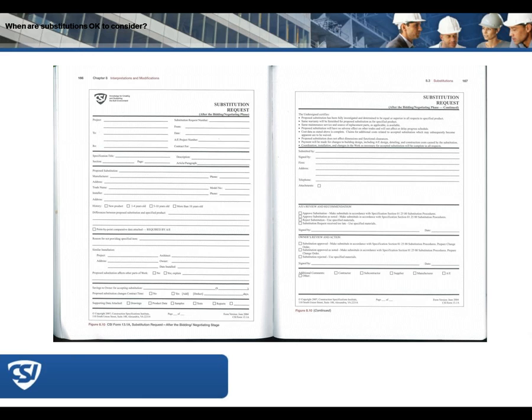Next, that the cost data is as it has been provided, so that if there is a savings or if for some reason there is an additional cost, and we'll talk about that in a few minutes when that might occur, that those costs are as stated, and that if there are any additional costs that may subsequently become apparent after acceptance of this substitution, those are going to be waived.